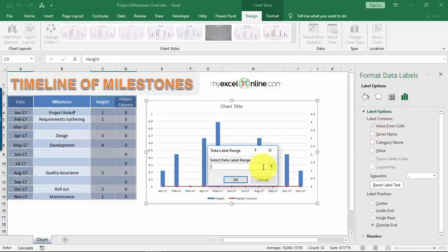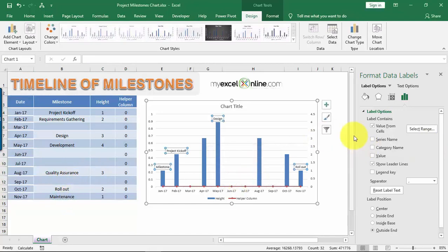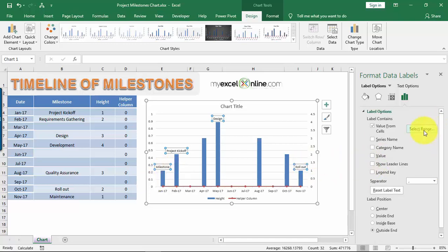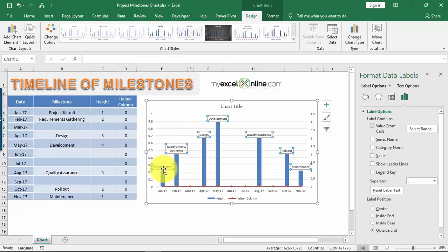Select the Milestone column as the data range and click OK. Make sure the label position is set to Outside End, and remove the leader lines. I selected the range incorrectly at first — I included the column header — so let me fix that range. Now we have the correct labels: Project Kickoff, Requirements, Design, Development, Quality Assurance, Rollout, and Maintenance.